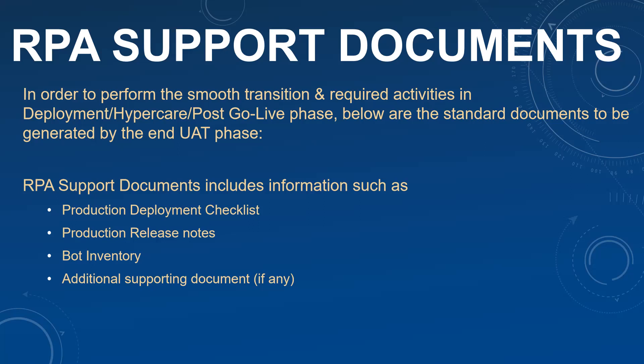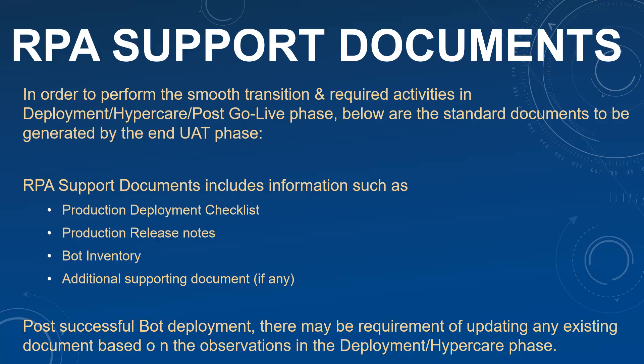We will discuss in detail about each of these documents — what they are and how to draft them. Post successful bot deployment, there may be requirements of updating existing documents as well. You need to be thorough about what documents were prepared and if any version change or updation is required. For example, the SDDs may need to be revised based on experiences in UAT, and any change requests that came up need to be incorporated in the PDD and SDDs. Those updated documents need to be presented as a whole package to the support team.